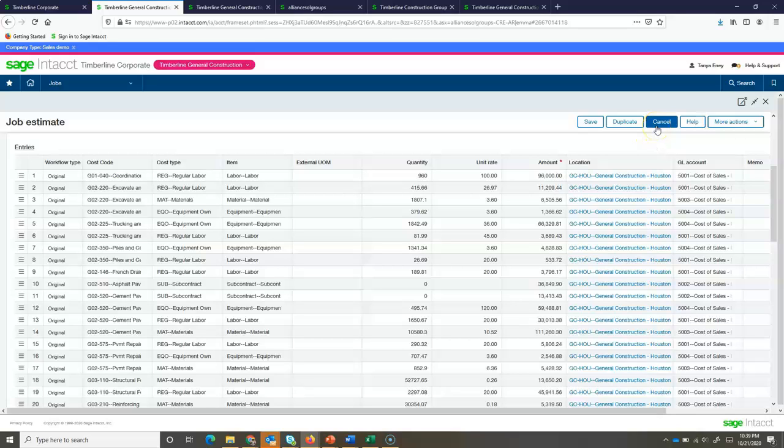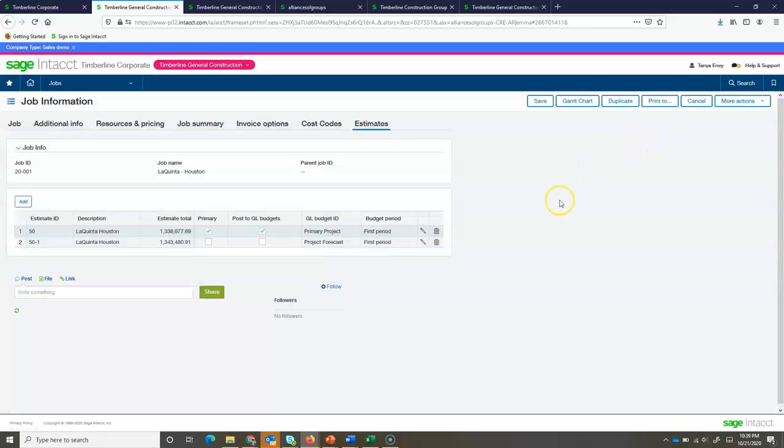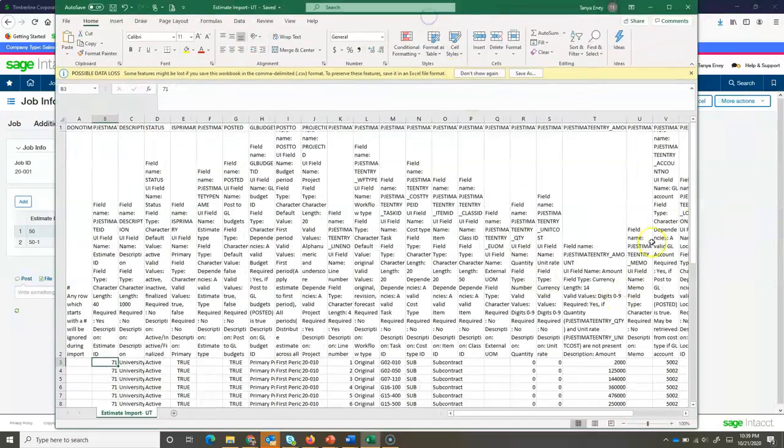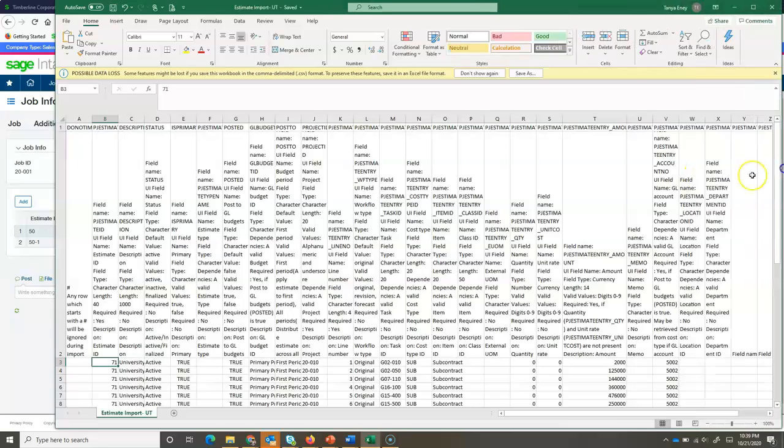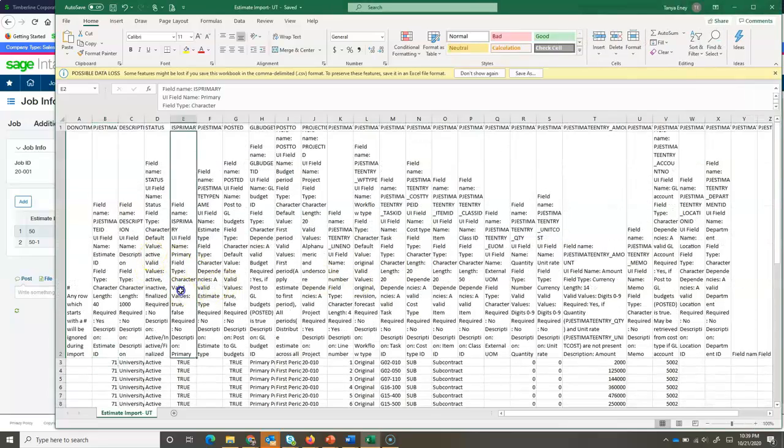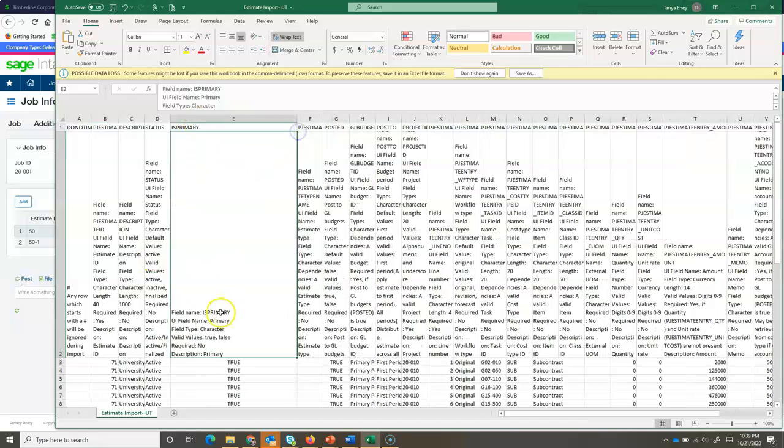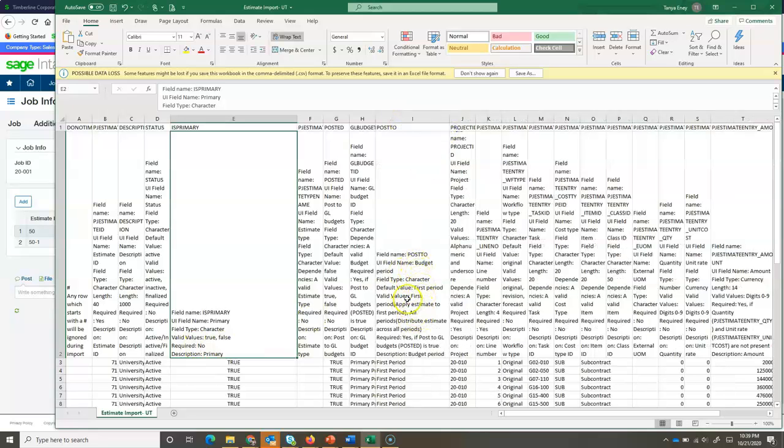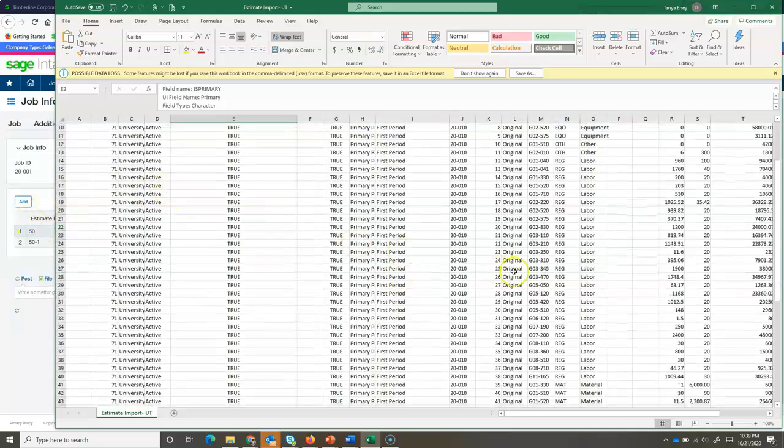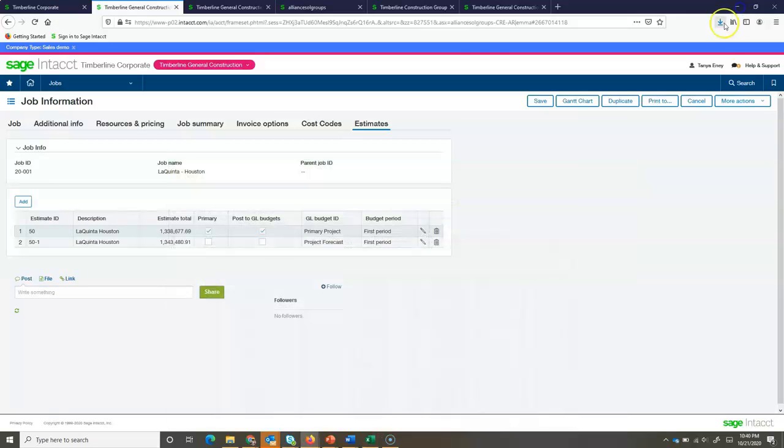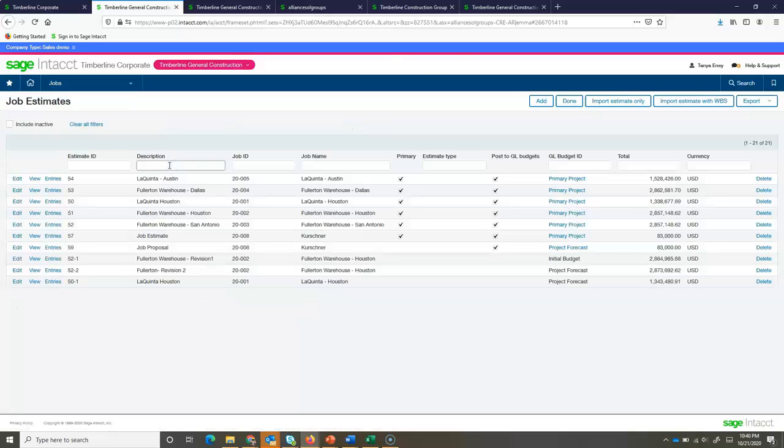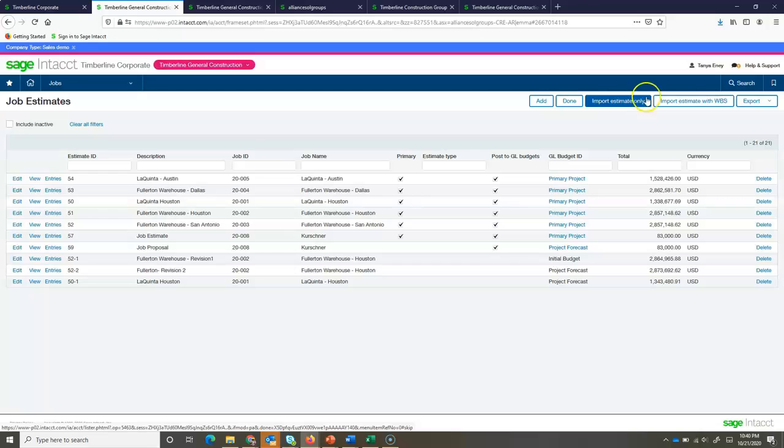So, now that my budget has been put together, we're going to be able to use it for reporting. I can import my budget and Sage gives me the ability to create a template. Let me drag this template over here onto the screen. So, this is the template that Sage lets me export. It's got all my columns with descriptions of what needs to be put in here, telling me if a column is required or not. Giving me all the details, all the rules and requirements. Then, I can populate it with all my information, the cost code, the dollar amounts. Then, I can utilize the import tool back here on my job estimate screen to import that estimate in.